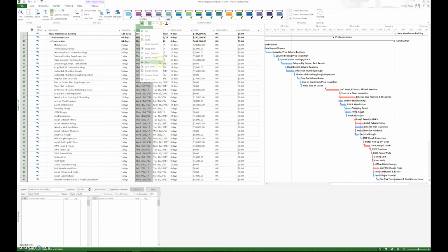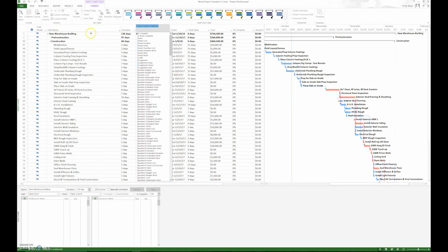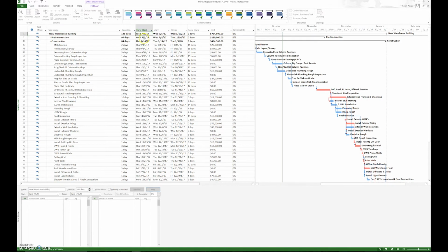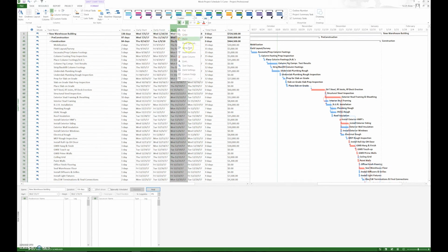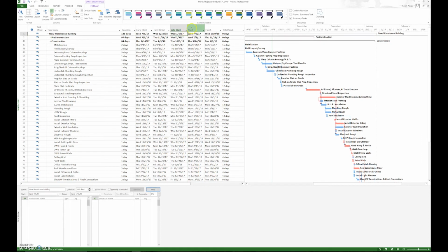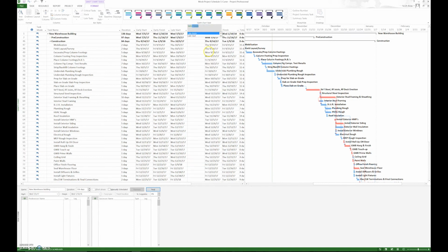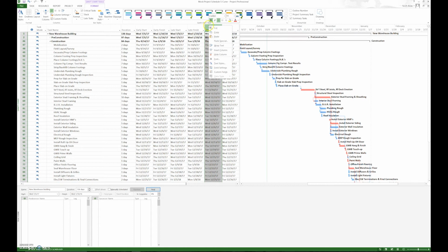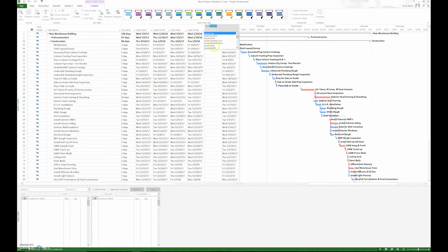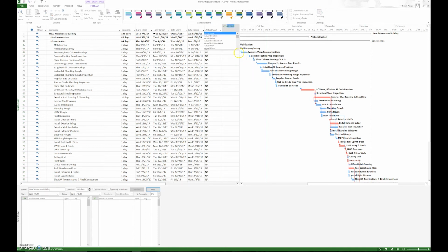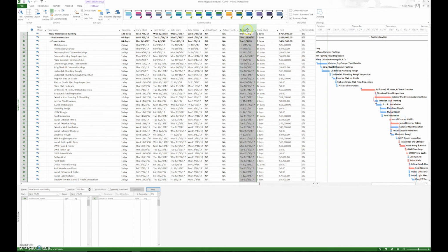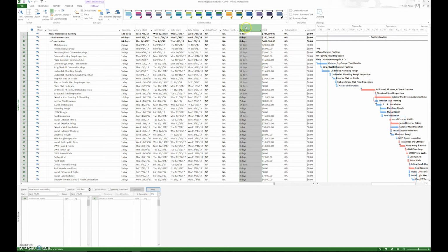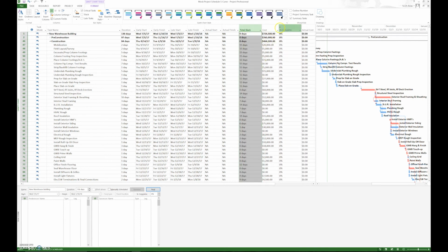And we want to be stuck with the traditional columns. And the traditional columns are task name, duration, early start, early finish, late start, late finish, actual start, actual finish. We want to hide these start columns. They have start and finish. That's just early start, a different way of looking at it. Okay. Total slack, cost, percent complete,